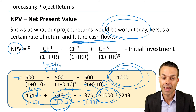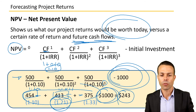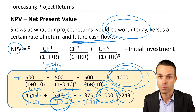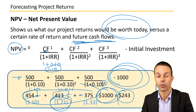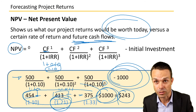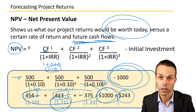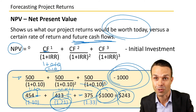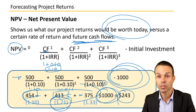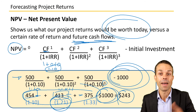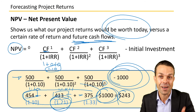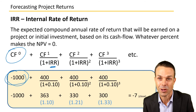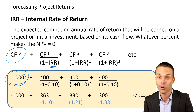After adding the discounted cash flows together and subtracting the initial $1,000 investment, we get $243. In the real world this could be $243,000 or $243 million depending on project scale. Any positive return is what we're looking for, and the higher the better — which brings us to Internal Rate of Return.